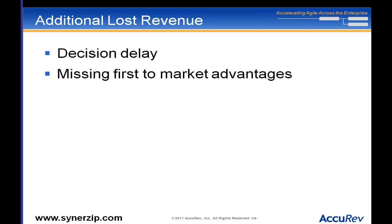A question came in pertaining to the cost of delay topic: 'You showed those pictures where features have a market window and value declines over time. How can teams actually assess and come up with those estimates so they can be more thoughtful about planning?' Good question. That's not always easy, but one method is to get various business domain experts together and have them estimate value much like developers estimate cost.